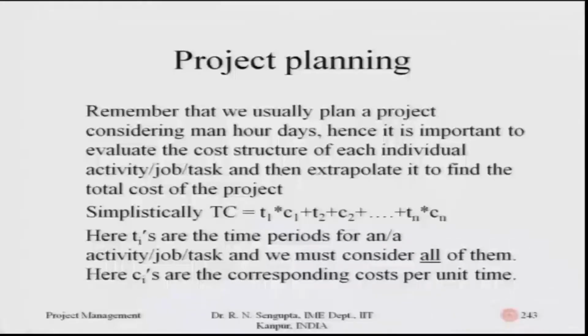Remember that we usually plan a project considering man-hour days. Hence it is important to evaluate the cost structure for each individual activity, job, task and then extrapolate it to find the total cost of the project. So, if I consider very simplistically, the total cost of that particular project would be based on the overall cost of each activity added together.